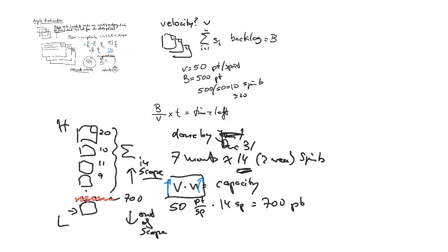So one common thing that, of course, people will automatically do is to say, well, just add more people to the project. Doesn't work. Brooks's law, right? Adding more people to a project that's late will very likely make it even later. In this particular case, we know exactly why. If I add another person to the project, it means that some of the people on the project have to take time out to get that person up to speed, which means their velocity drops, which means the total team's velocity drops because the new person is not yet contributing. So velocity drops instead of increasing.